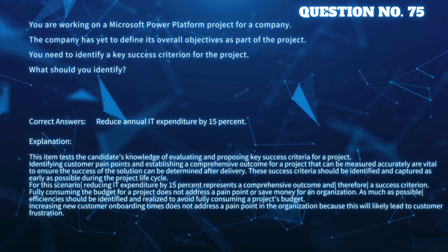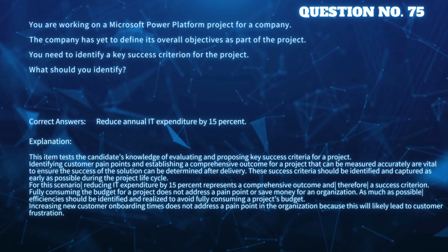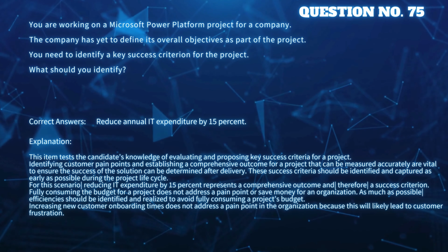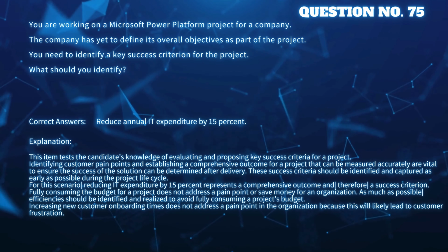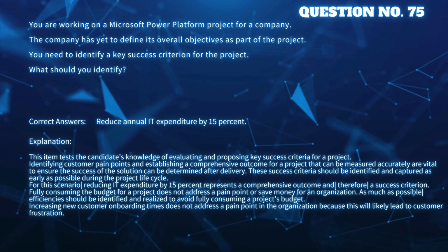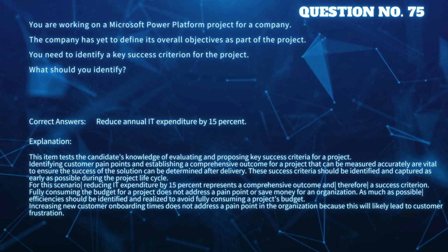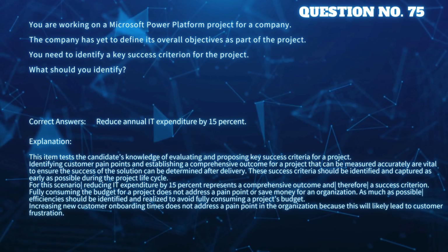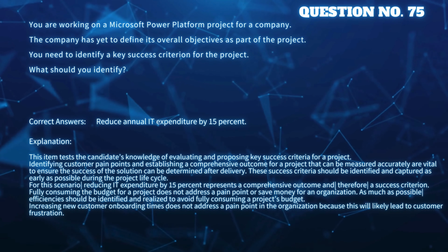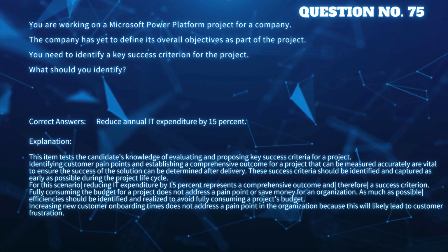Explanation: this item tests the candidate's knowledge of evaluating and proposing key success criteria for a project. Identifying customer pain points and establishing a comprehensive outcome for a project that can be measured accurately are vital to ensure the success of the solution can be determined after delivery. These success criteria should be identified and captured as early as possible during the project lifecycle. For this scenario, reducing IT expenditure by 15% represents a comprehensive outcome and, therefore, a success criterion.